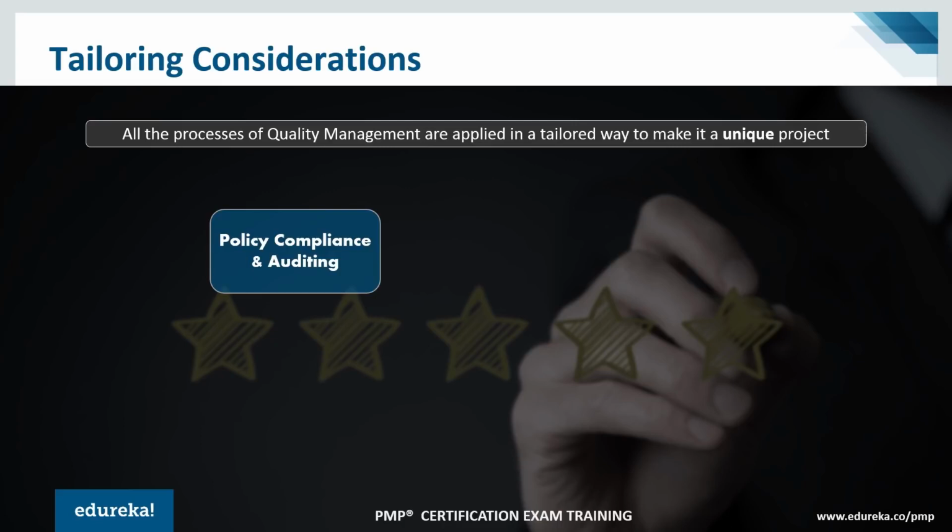We had to take the code freeze approvals at least 14 days before we put code into the production environment. That was something very unique to that compliance requirement, and that was audited as well. So we had to retain those audit trails and those evidences, which we could then produce when the audit is conducted. So that's a very quick example, which may not be required on all projects.